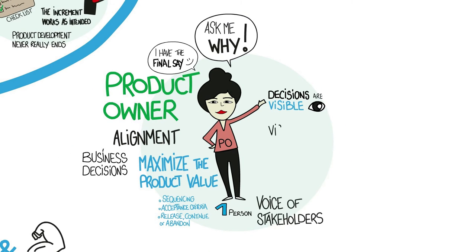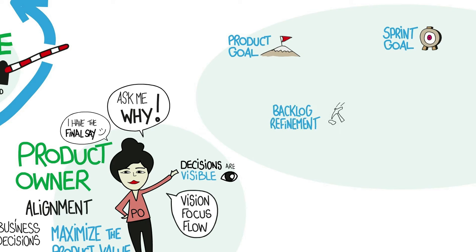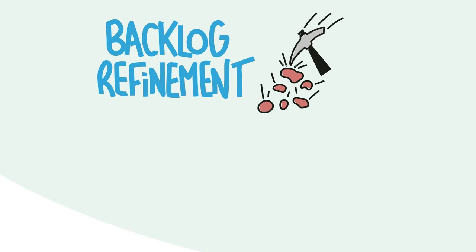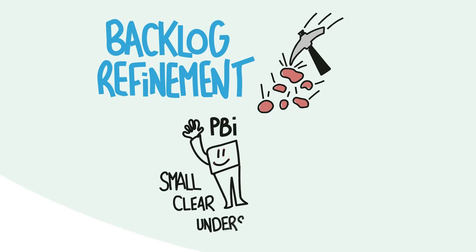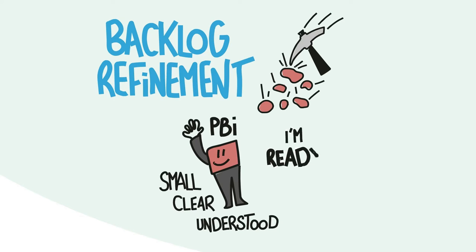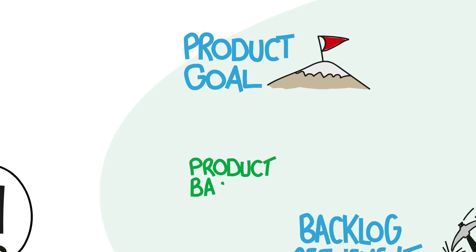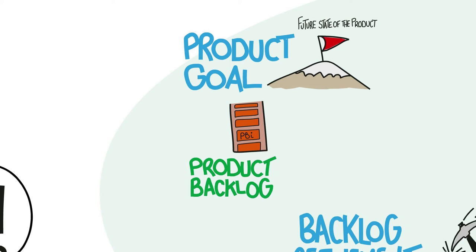Traditionally, the product owner's mission has been summarized in three words: vision, focus, and flow. Scrum represents these concepts through the product goal, the sprint goal, and backlog refinement. Backlog refinement is the process of making the most important backlog items transparent, visible, understood, and small. Backlog items that are small enough to be completed in a sprint are considered ready. The whole team is involved, stakeholders can be invited, and the product owner is accountable. The product goal describes a future state of the product, and the rest of the product backlog emerges to define what will fulfill the product goal.